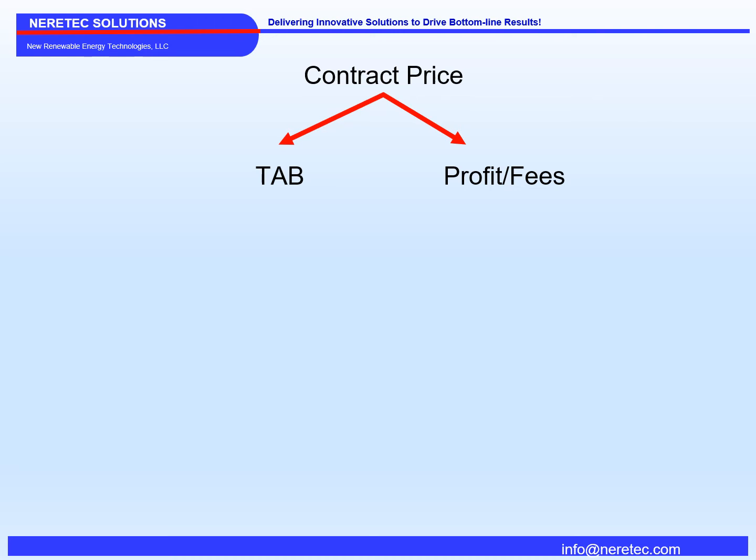The total allocated budget depends on where you are in the management process of that particular project. If you are right at the beginning of the project, that could be just the negotiated contract cost. Remember, I said cost, not price. If you've been running for a while, you may have some authorized but unpriced work. At this stage, if you add the negotiated contract cost to the authorized but unpriced work, you get what we call the contract budget base.